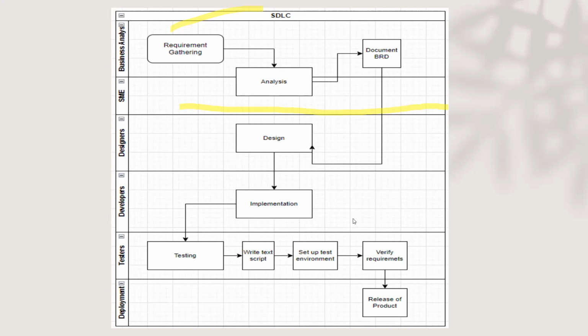impact on our original design, implementation, cost, and time. So there's going to be a change management. That's why we always have the freeze here. Whether it is an agile environment or a waterfall environment, we'll always have that freeze. But if there is additional change coming in, we'll go through the change requirement process to add it to be part of our requirements.